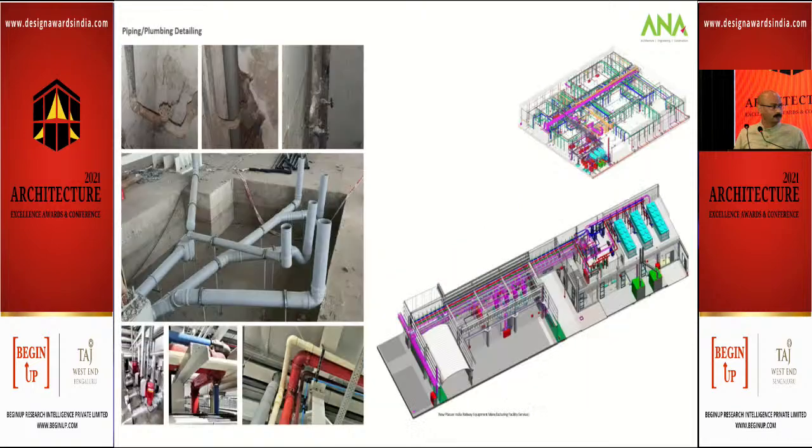The other thing that has happened during the pandemic is that in our industry, when you've gone back, especially in June, July of last year, you've had to go back to your clients and say, okay, you budgeted 100 crores for this project. It's not going to happen in 100 crores. Now pricing has gone up. It's now going to be 110, 120, depending upon the size of the project. So even if you were doing something which was 2 crore rupees, it hasn't been finished in 2 crore rupees. You've either had to put more cash or curtail your desires. But that didn't happen in the other industries. Your phones didn't become more expensive.